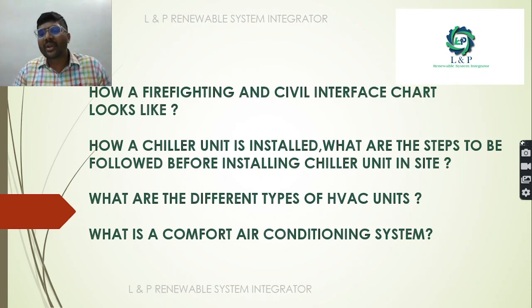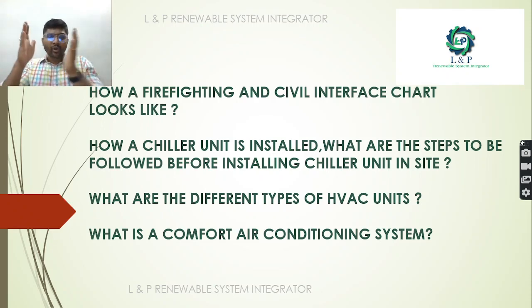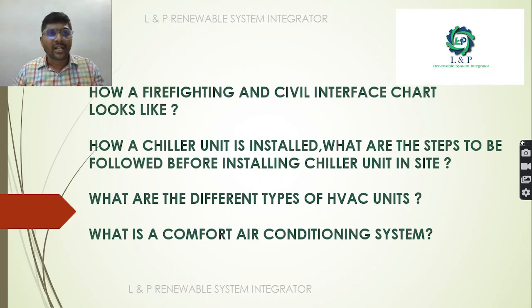So what are the things that we are going to discuss in Part 3? If you are planning to establish a firefighting system, what are the things that we need to coordinate or interface with the civil? We have created a chart classifying the activities into two categories, predecessors and post categories. It means before doing any sort of firefighting activity, what is the first civil activity that you will do? Then what is the next important activity that you need to do in the firefighting? Then what is the civil activity that you need to perform after the completion of that firefighting activity?